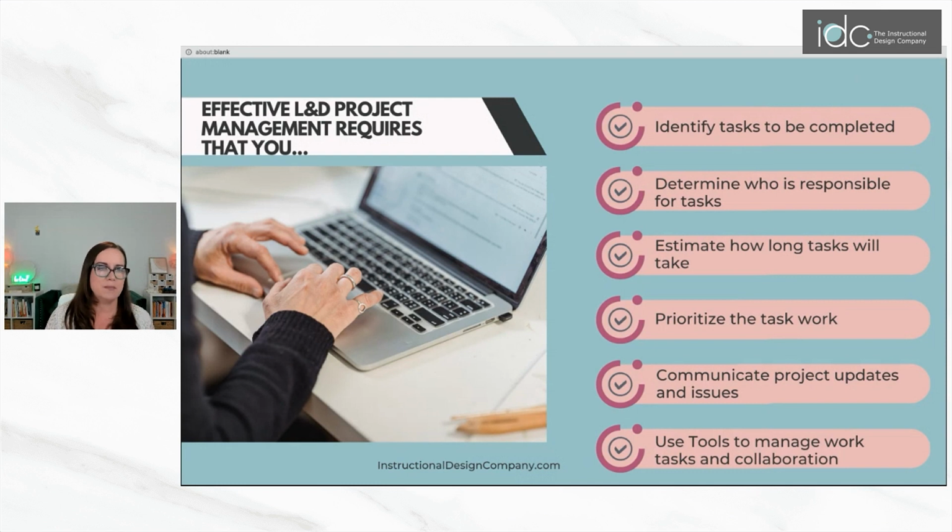Effective L&D project management requires, so some of this is going to be a recap, okay? It's going to require that you identify the tasks to be completed, who's responsible for those tasks, how long each of those tasks will take. Then you have to prioritize that work, right? Because some things have to happen before other things.